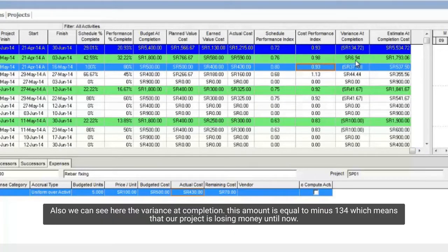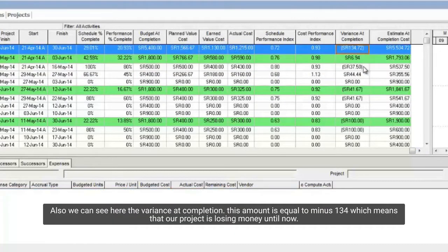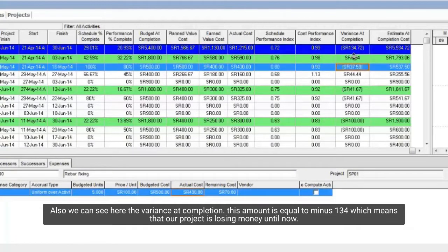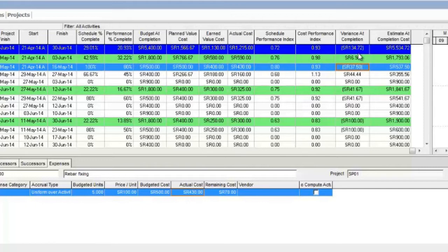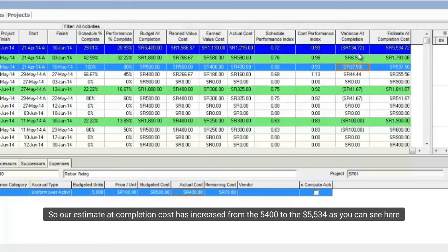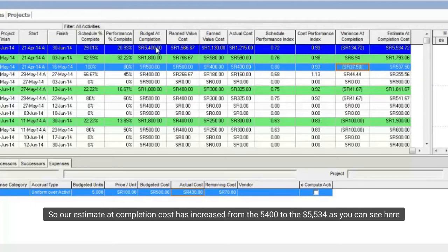Also, we can see here the variance at completion. This amount is equal to minus $134 which means that our project is losing money until now. So, our estimated completion cost has increased from the $5,400 to the $5,534 as you can see here.